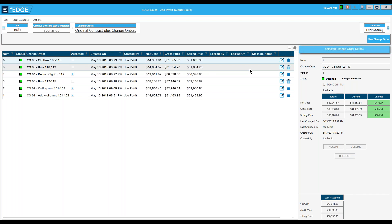We have another question from Christopher: if a declined change order is later approved, how do you change or modify it? Great question — you change it by creating another copy of that same change order, give it a new change order number with the same information, and then accept that one. Thank you everyone for joining — that's all of the questions today. Have a great day.